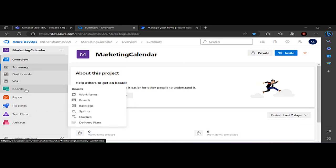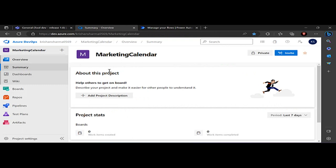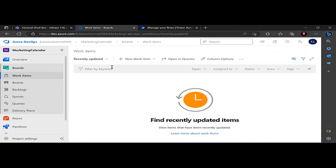I'm focused on the boards because that's where our automation applies. The scenario is: whenever someone posts a message in a team channel — say a manager or tester — and that post mentions you, one task or issue item should automatically be created under your project. This is valid whenever you have testers or QA involved; they can just push a message within Teams rather than logging into the site to create those items manually. A Power Automate flow can mine the message and create a story or bug for you.